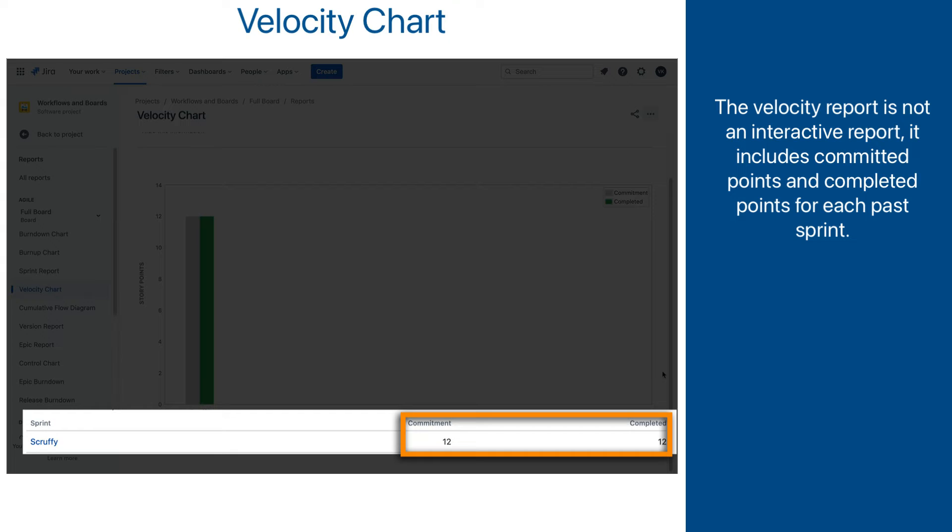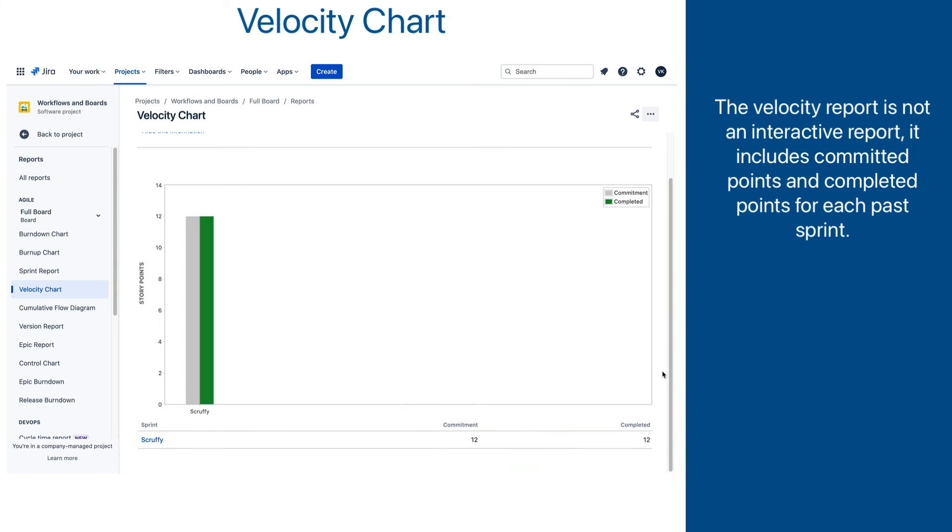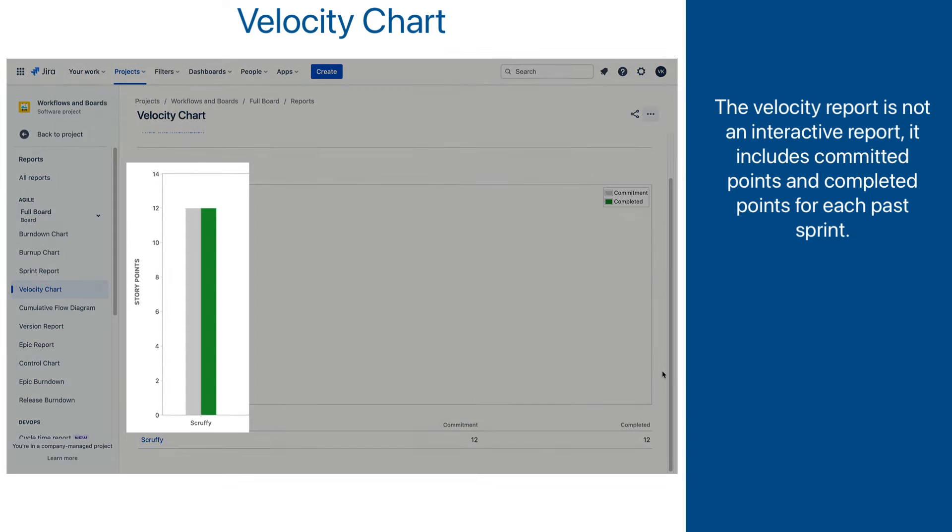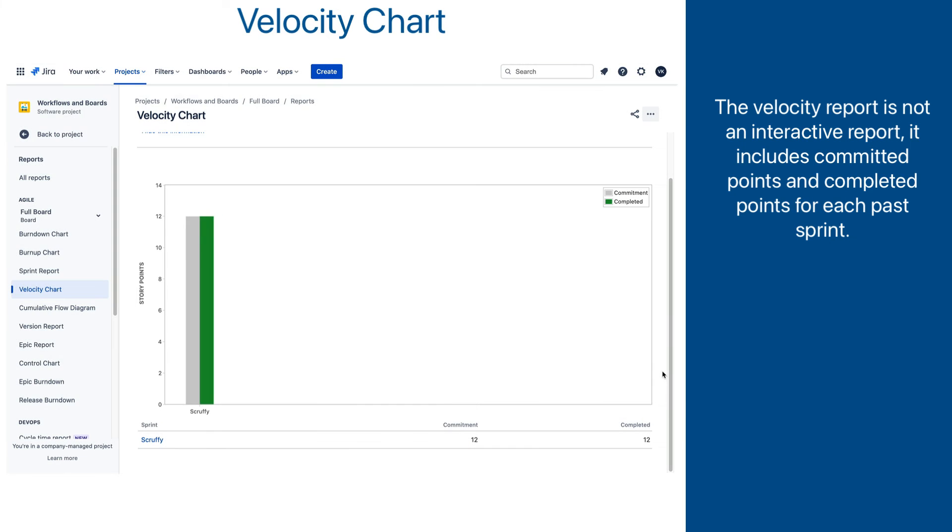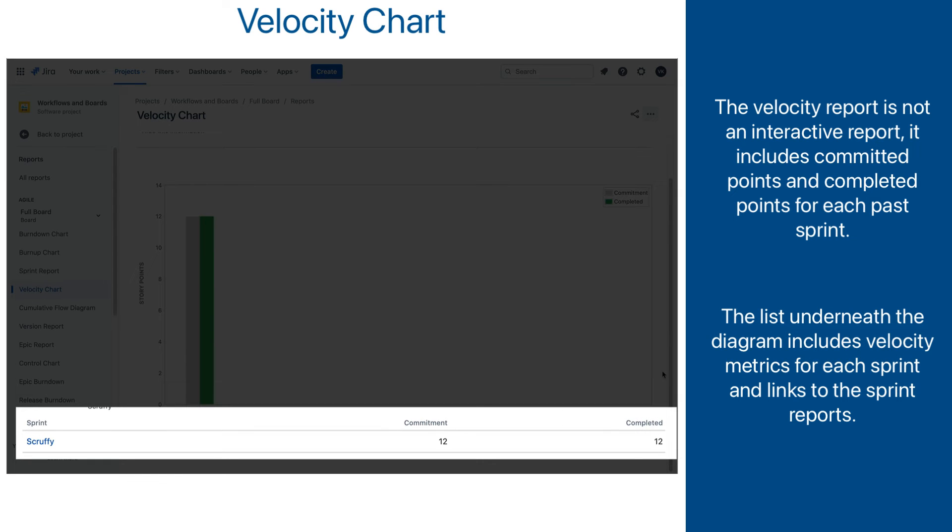Committed points value represents how much work a team planned to do in the sprint, and completed points represent how much work they actually did. They are displayed as a bar chart, side by side for each sprint, as you can see here for the Scruffy sprint. There is also a list format underneath the diagram, and here we can actually click on the link to get into the sprint report for each listed sprint.